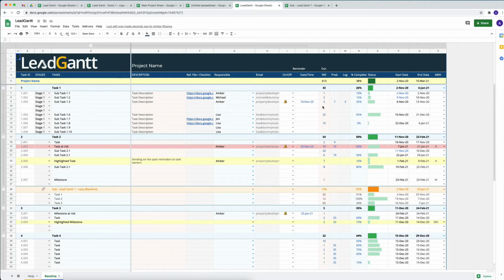a template and use one of your old projects that you've completed, that's finished, and no need to save a template, no need to manage them or anything. Anytime we do a project, we will always come up with things that we might have missed out in baseline, and then we can add them in the actual scenario while the project's unfolding. And it would always be like an updated version of the checklist or updated version of the project that you've just finished recently with all the updates.